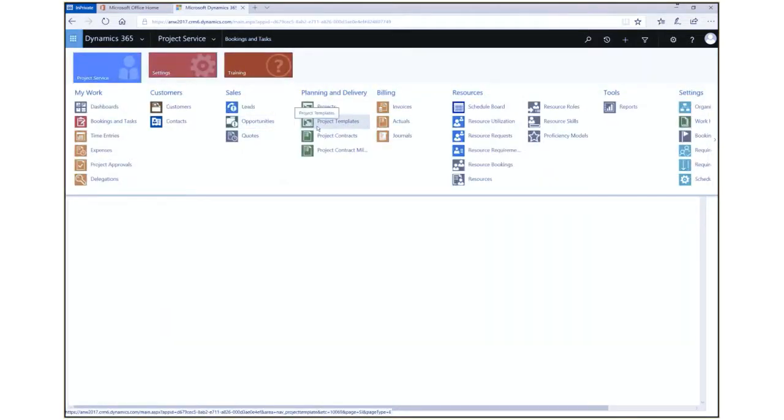Once a project has been delivered, you can create a copy of that project to build a project template, or you can build project templates from scratch based on best practice of your organization and apply each customer project to that format, allowing you to reschedule the start and end date and the team members that are applied to each project as the template is created. From here, you're able to generate your invoices based on milestones that have been set up on the project delivery cycle.